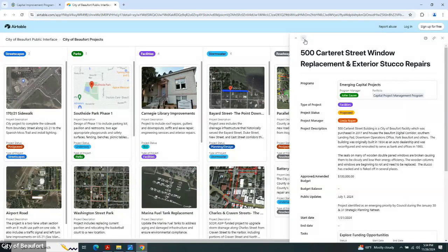So we are awaiting a second bid from a second manufacturer of the windows, and we are hopeful to have that bid. We were supposed to have those numbers on Friday, but we're hopeful to have it this coming week so that once again, Jay can package that contract together and send it out, and we can get this project started at the beginning of the year. Hopefully have that done rather quickly, as it's not a large project for them to do.